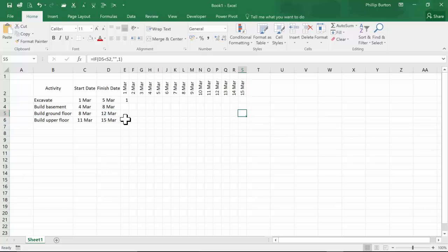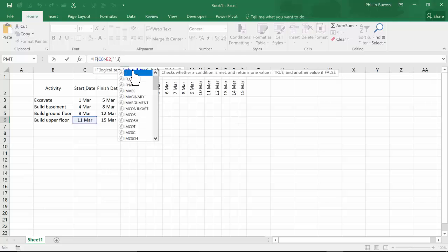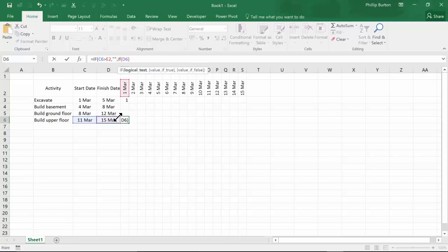So now let's tie those together. If the start date is later than the current date, then it's too early. If the end date is before the time now, before the current date, then it's too late. Otherwise, it's just right.